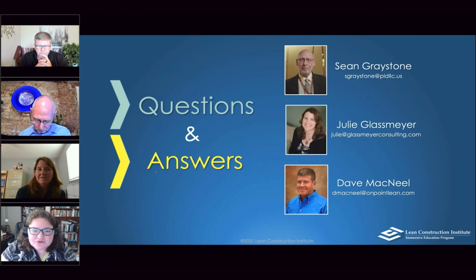Okay. Our next question is, who is authorized to give credit when calculating PPC? Julie, you want to take that one? Sure. The yes, no, as Dave was saying, should be a process that's happening on a daily basis in the huddles. So depending on who is facilitating, running that session and going through and asking about yesterday's work, today's work, the yes, no is really a group decision. Hey, did that get done as it was supposed to be or not? It's not really a deeming of whether it was done or not. It's the discussion. And then if the answer is no, it wasn't done according to plan, going through that 5 why discussion and saying, well, why was it?